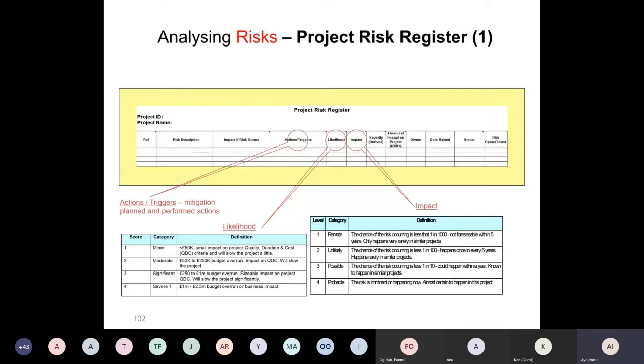The project I'm on at the moment started last year, August. This is August, another year. That's 1 year. And in our risk log, you know what? We have 120 something risks documented already. Out of the 120 risks documented, maybe 7 of them have been moved to issues. Like I said earlier on, they were key ones that happened, so we had to move them to issues. So you have to always make sure that these are documented.